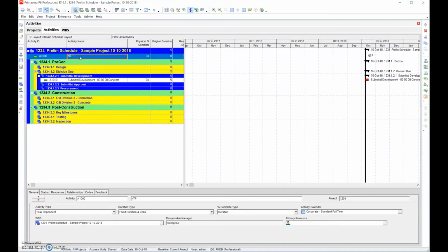Let's talk about naming structure here. The naming structure is important because you have to be able to name everything by verb noun. Once again, to make it clear, verb noun. I like to even say quantifiable. If it's not 100%, then we'd want to actually specify 50% or 25%. If we're talking verb noun here, you see NTP.